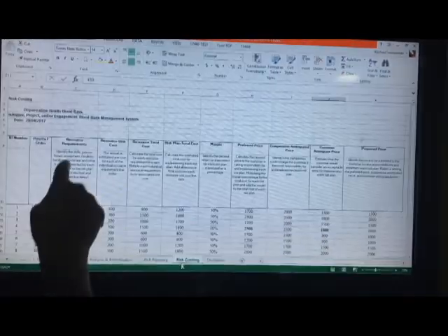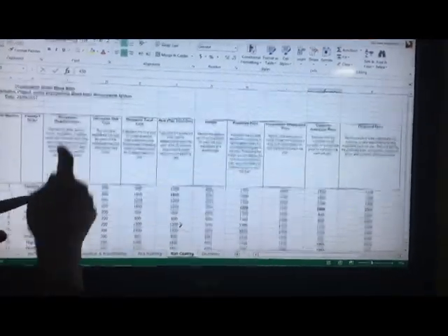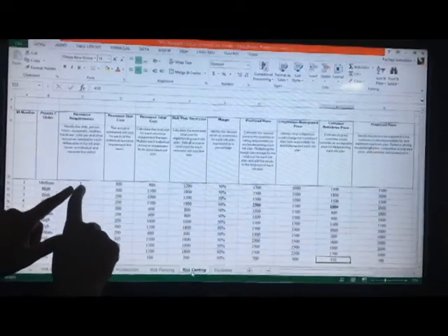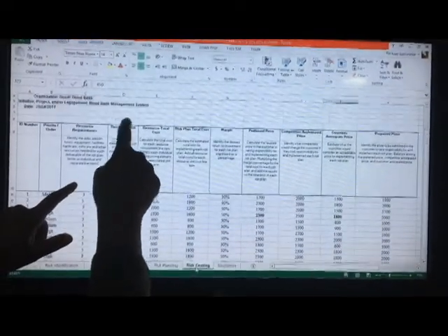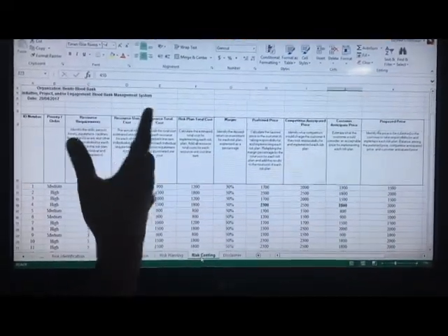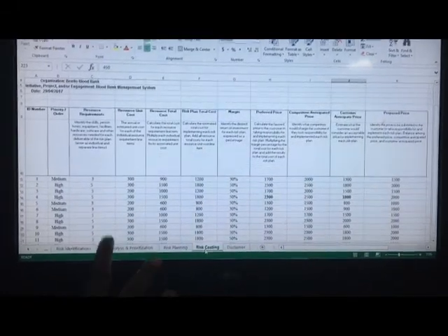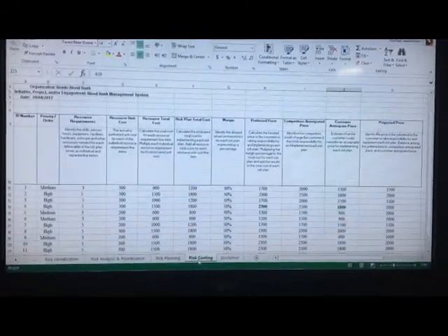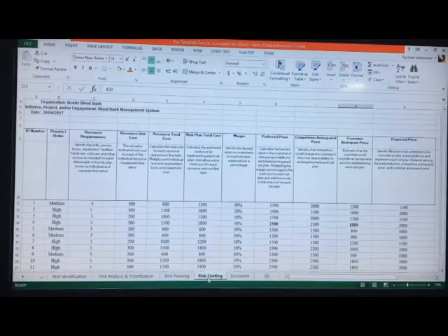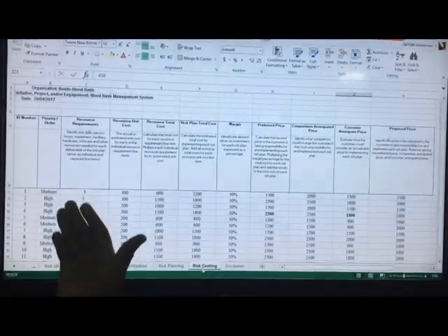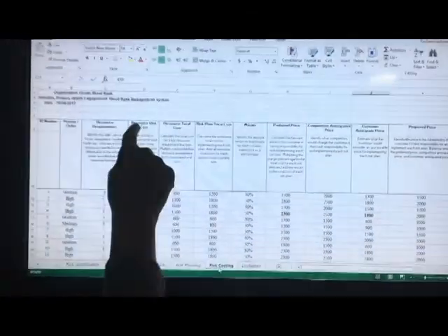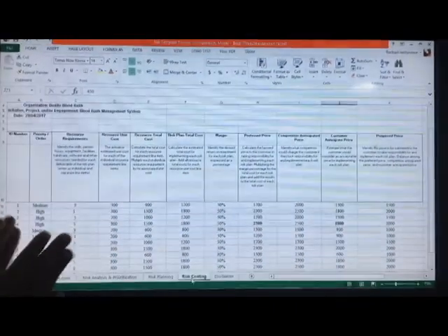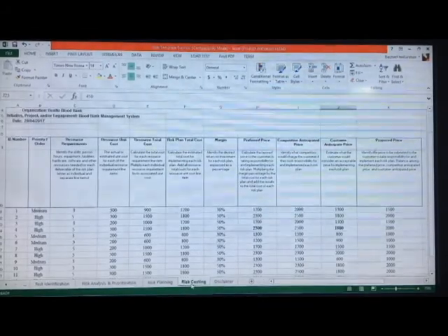Each risk was assigned a priority from the previous sheet, and was also given a resource requirement and a resource unit cost. The resource requirement is a numeric value to identify the skills, person or hours, equipment and facilities, and other hardware and software requirements for this risk. The resource unit cost is the estimated price for each individual resource requirement.